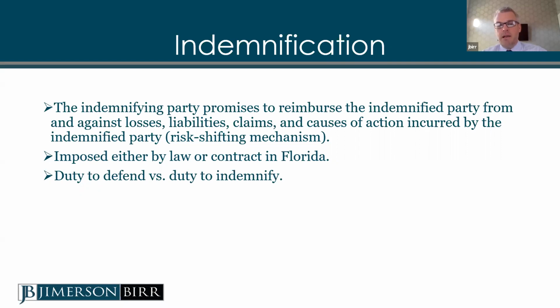The other thing to keep in mind is a well-written indemnification provision in a contract is not only going to speak of indemnity, but it's also going to speak to the duty to defend, which means that party has a requirement to defend against any claims, not just pay for those claims. So there is a difference. Defend meaning if there's a lawsuit or other dispute resolution situation, the party who is doing the indemnifying will have to defend the other party as well.